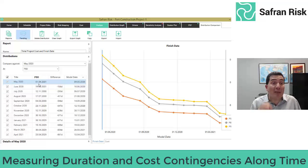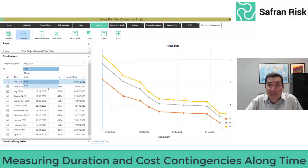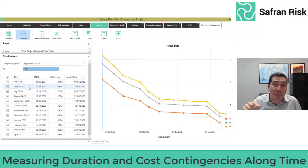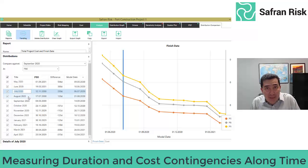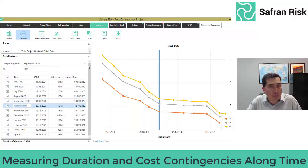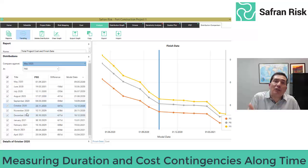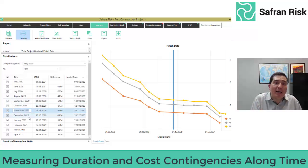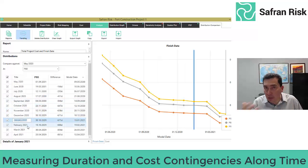We are assuming that project contingencies are assigned at the 80th percentile. As time passes by and uncertainties diminish and risks materialize or not, the monthly recording of total duration's 80th percentile allows us to quantify the difference in contingency over time.